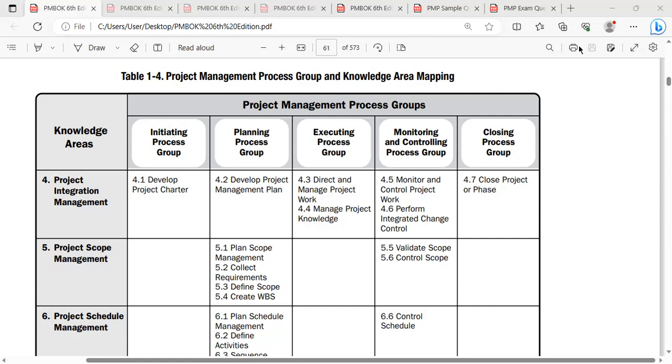So actually the Project Management Institute, through its Project Management Body of Knowledge, is advising that after you develop your charter, and you bring the project manager into the project charter, and the sponsor or initiator signs the charter and gives the authority to the project manager, the next thing the management has to do is advise the project manager and the team to develop the stakeholder register. Right?